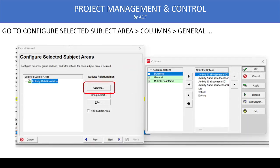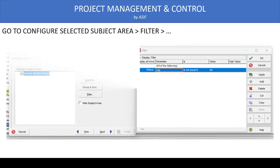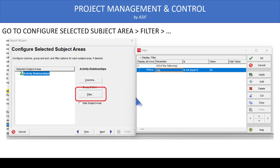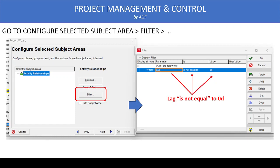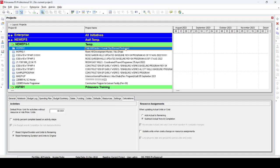When Activity Relationships is selected, we modify two things. First, under Columns, go to the General tab and add Activity ID and Name for predecessor, and Activity ID and Name for successor activities. We can also add Lag, Critical, and Driving fields. Then in the Filter, select Lag is not equal to zero — this will show all activities having a lag greater than or less than zero.